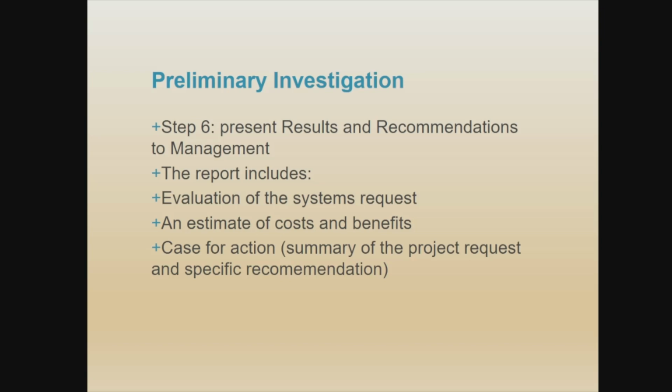This one is in terms of the report. When you have already gone through step 1 until step number 5, then you come out with a report as the output of whatever activities that you did. Okay, the previous part, then you need to come out with the report and present it to the management. The report should include the evaluation of the system request, estimated costs and benefits in terms of RM, the case for action, a summary of the project request, and specific recommendations.